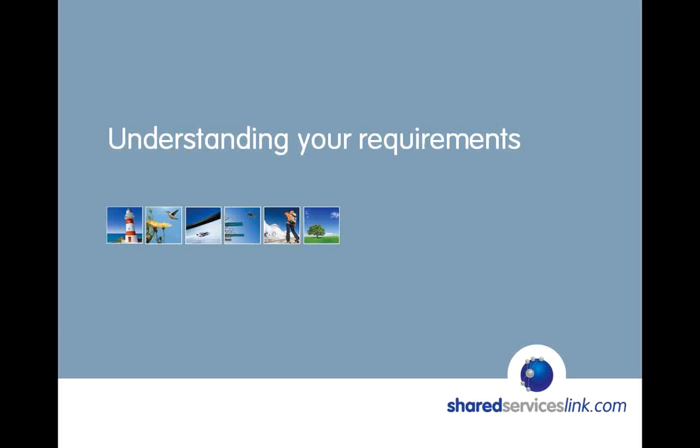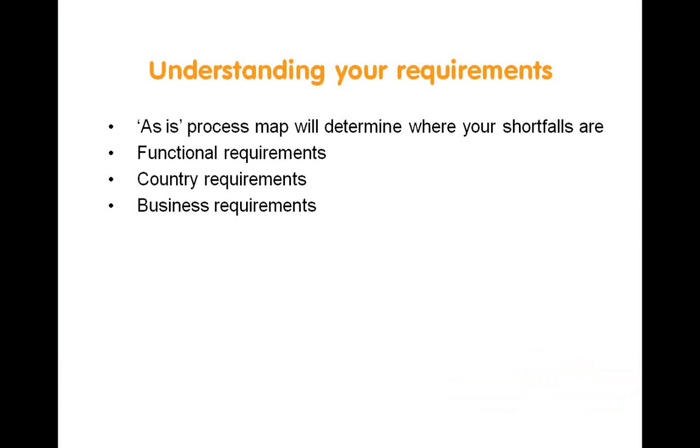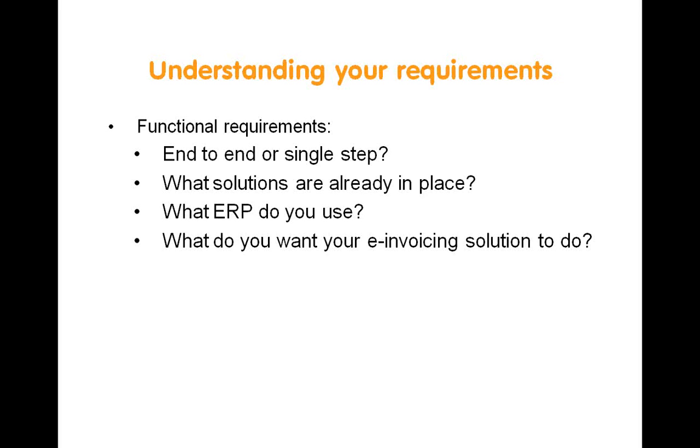Okay. Understanding your requirements. Now, this is key because before you go out to market and you go out to assess what's out there, you do really need to know what your requirements are. So you need to know what your as-is process is, and that will determine where your shortfalls are. You need to know what your functional requirements are, your country requirements are, and your business case requirements.